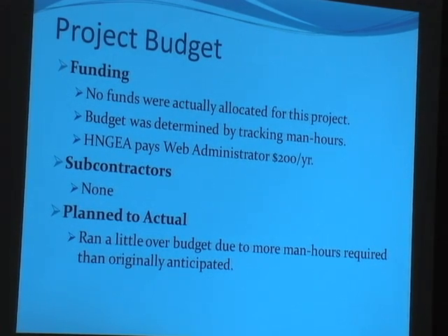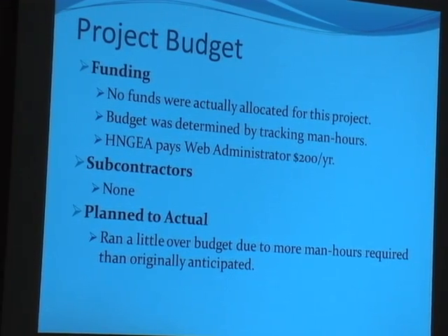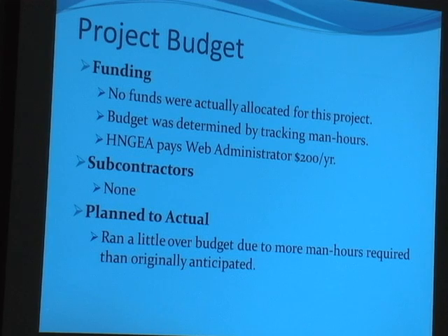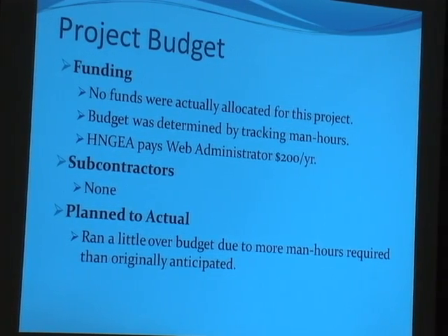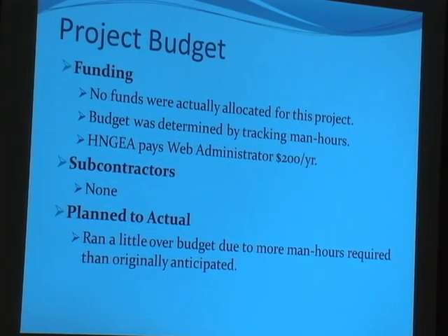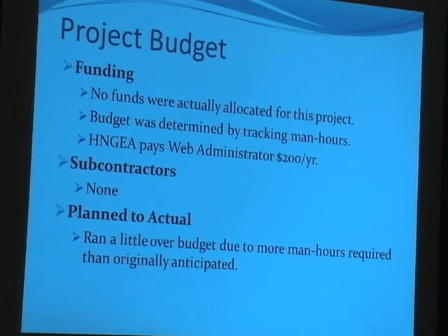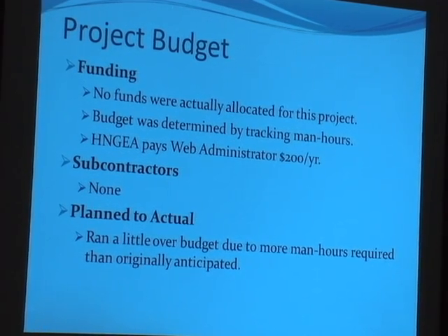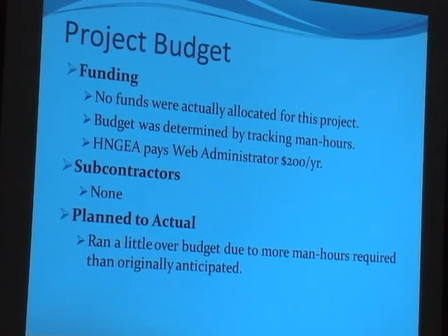Concerning the budget, there were no funds actually allocated for this project, so we tracked our budget by actually tracking man-hours and the manpower costs. No subcontractors were used, it was just the project team. And we were a little bit over budget because of the man-hours required in some instances.